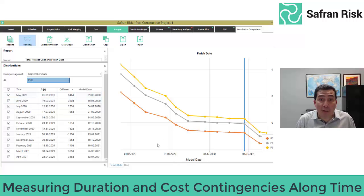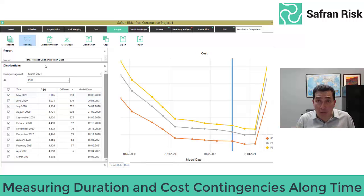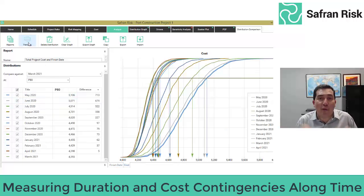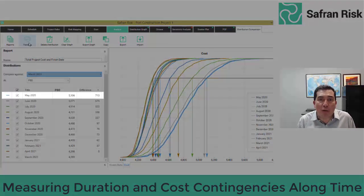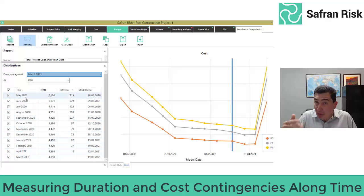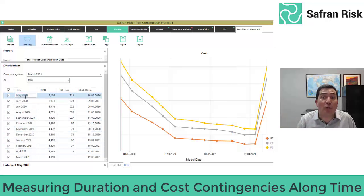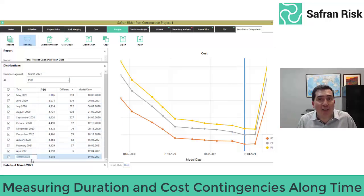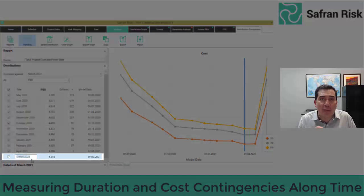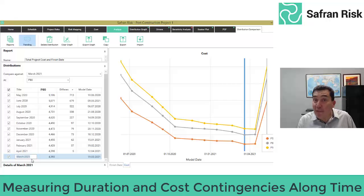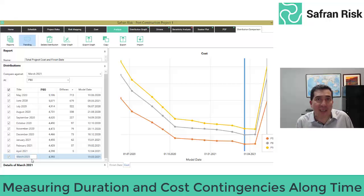By the same token, you can evaluate cost contingencies over time. For example, in this case on May 2020, P80 was deemed at 51.06 in this project. By March 2021, total project cost 80th percentile has established itself at 43.93, a 14% reduction on cost contingency allocation.